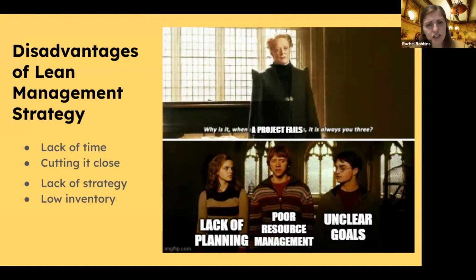The last disadvantage I found with this project management strategy is problems with inventory. With Lean management, cost saving is a must, but that requires the company to keep inventory stock low. And with a low inventory, your customer could not want to wait on that specific project or that product, which has you rushing to make sure that the supplier can deliver the product quickly and still efficiently. But this could end up costing more if the supplier ends up having to rush, which defeats the purpose of cost saving.